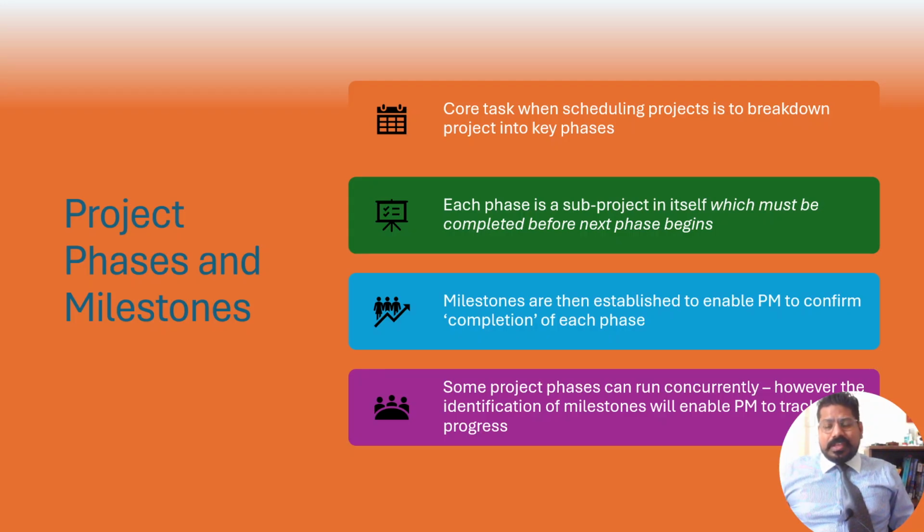There are three techniques. One is crashing. One is parallelly doing the activities. So in crashing, what we do, we put more resources into one activity. So let's say the construction of a wall takes 10 days by 5 people. Now I'm putting 10 people in the construction of that wall so that the work can be completed in less time. This is known as crashing.